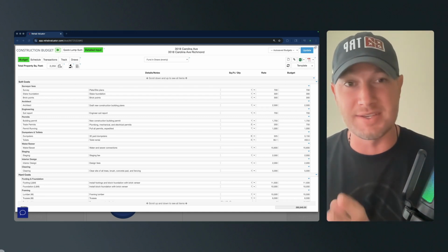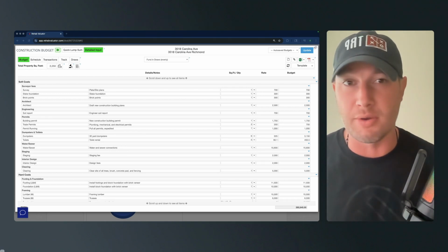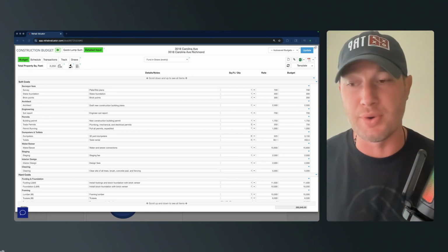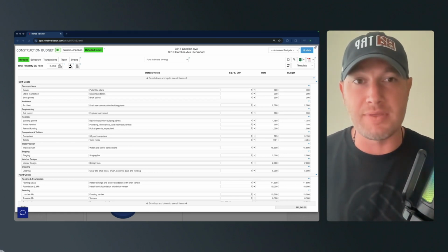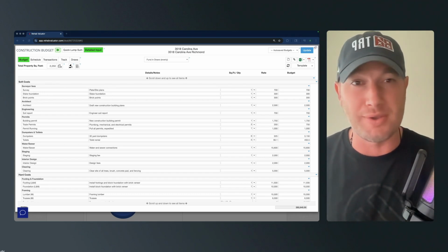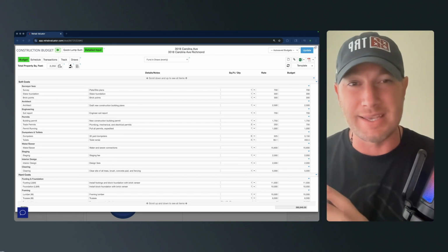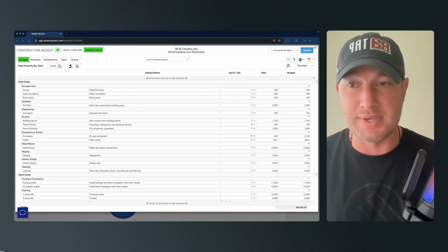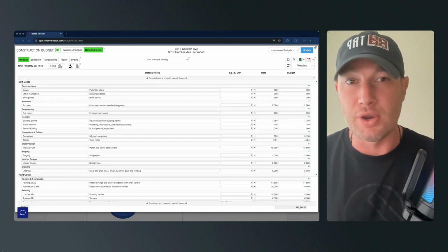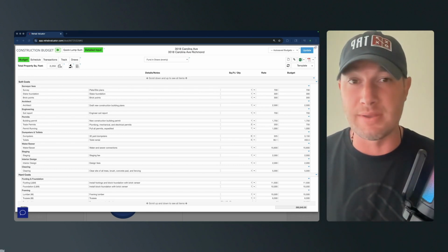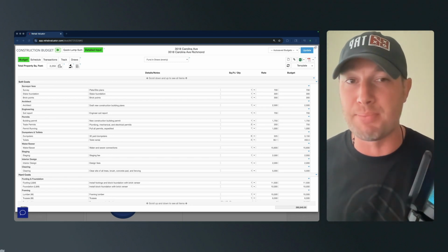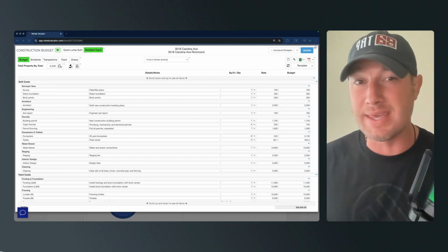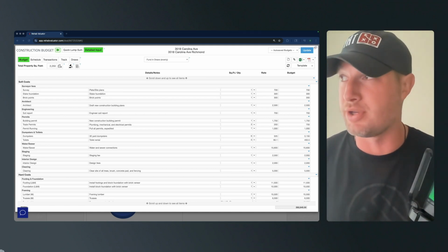But even there is a little bit of overlap because we need a third-party contractor to hook up sewer in the right-of-way areas, but the water is going to be everything. All of our jobs going to be within our property line for the most part. There's just gray area there, and it gets kind of confusing sometimes. So this is something you really need to focus on early in the process and early in the project so you know what you're doing and what you're going to spend. So I recommend putting a big contingency cost within this line item to make sure you're in good shape.